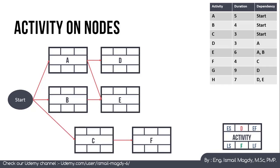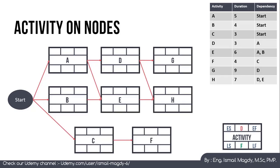Activity G depends on D, and activity H depends on both D and E. At the end we always have the project end point connected to the latest activities. Now that we have drawn all activities and their relations, we can start calculating the duration and the start and finish dates for each activity. We add the duration of all activities to their respective nodes.